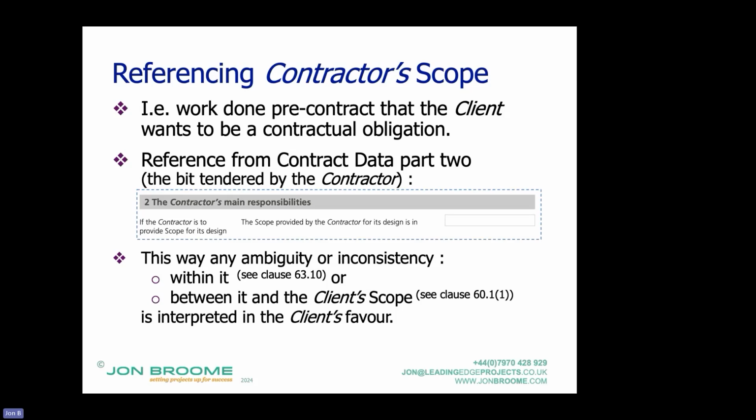NEC, because of some wording in 60.1 bracket 1, basically says any design done pre-contract by the contractor, if it's referenced here, has to comply with the client's requirement, the client's scope in NEC speak. And if it doesn't, the contractor has to correct what they've done in here to comply. So the cost, the risk falls on the contractor. So that's a really important point.